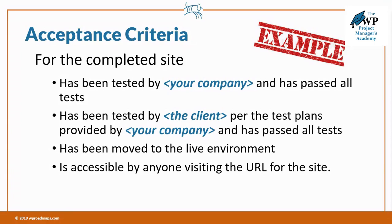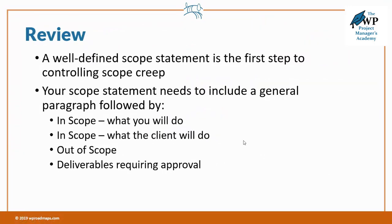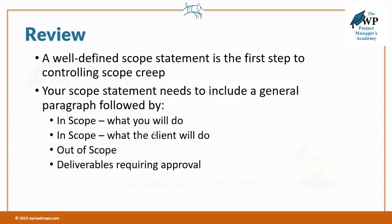Let's do a quick review. A well-defined scope statement is the very first step to controlling scope creep. Within the Project Managers Academy, we've got the scope creep elimination roadmap, which is super helpful. Your scope statement needs to include a general paragraph, what's in scope that you will do, what's in scope that the client will do, and what is out of scope for the project as a whole, plus your deliverables that require client approval with a description. For more information, it's all inside the WP Project Managers Academy.